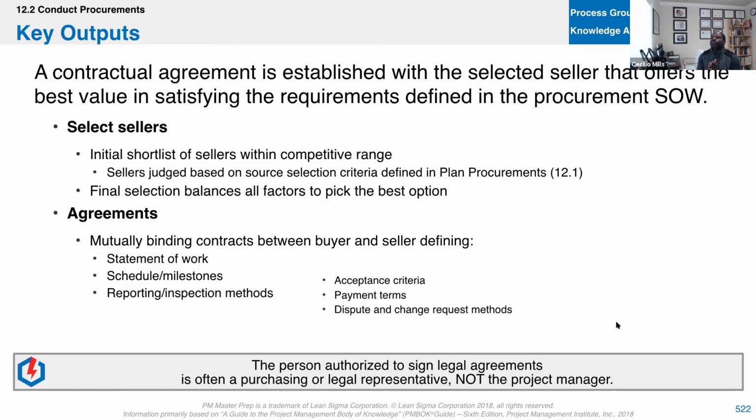The third one is going to be procurement negotiations. The PM is not responsible for procurement negotiations. Usually this is done by legal or supply chain or purchasing or whatever your company calls it. There are some instances where you as a PM, maybe an owner's rep, or you're actually executing contracts and finding vendors. But for the majority of PMs, they don't do that. And PMI wants you to know that, because of the way the questions will be asked, when I say the PM's not going to be responsible for that.